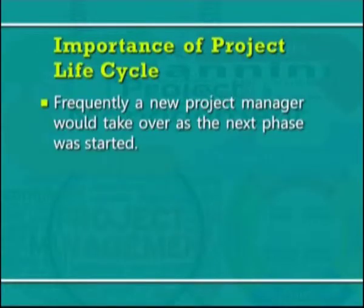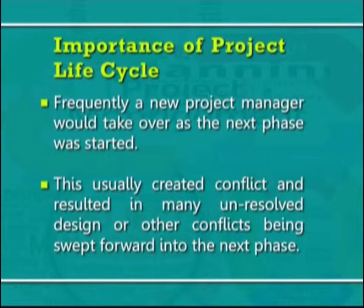Let us understand now the importance of project life cycle. All projects consist of a number of different phases that form the life cycle of each project. In the earlier years of the development of modern project management practices, it was common to see each phase of a project being planned, scheduled and managed as a separate project from start to finish of each phase. At the earlier decades, frequently a new project manager would take over as the next phase was started. This usually created conflict and resulted in many unresolved design or other conflicts being swept forward into the next phase, especially in design.